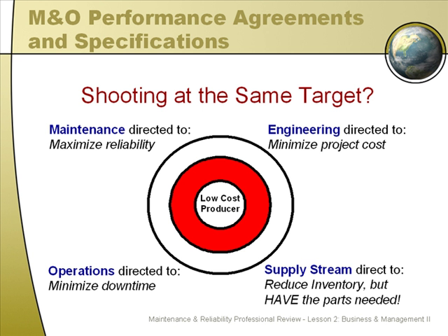In a proactive organization, the life cycle cost of the machine would be the deciding factor for an engineer who would be buying the equipment to satisfy the standards and needs of the maintenance department for maintainability and the standards of the production department for reliability and productivity. In other words, they need to understand that there's more to doing a project than minimizing the installation cost, and they need to be rewarded for that when they do it right.